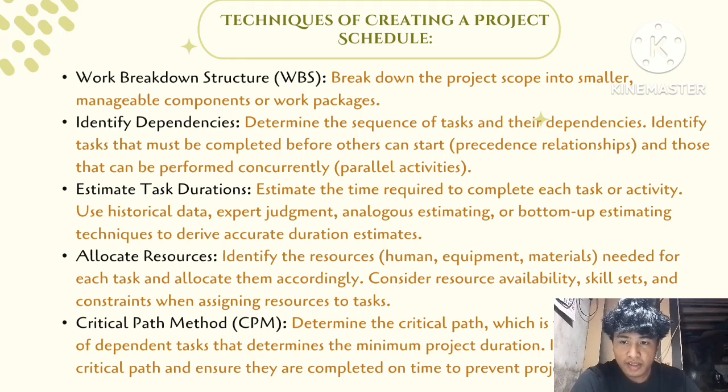Identify dependencies. Determine the sequence of tasks and their dependencies. Identify tasks that must be completed before others can start, and those that can be performed concurrently, which is precedence relationships and parallel activities.